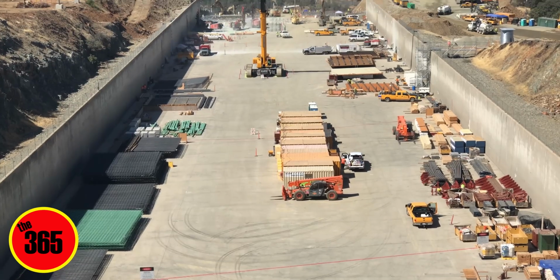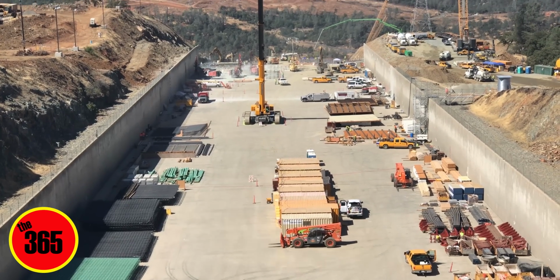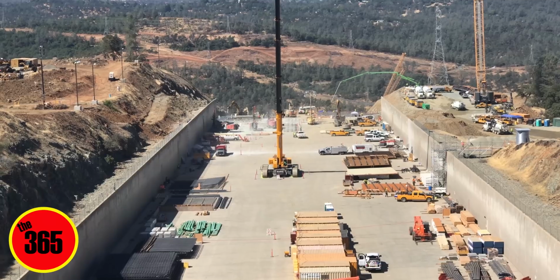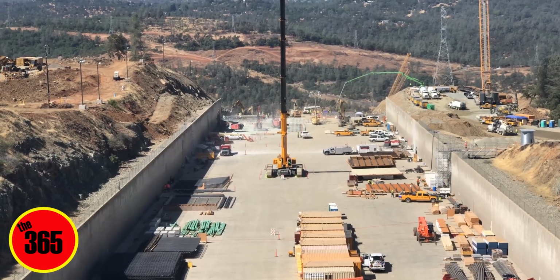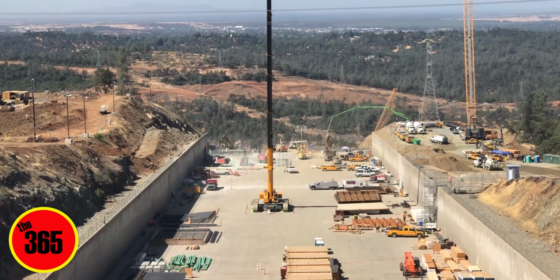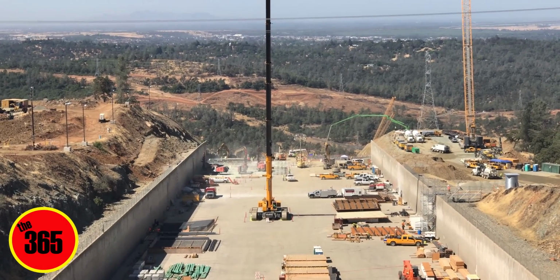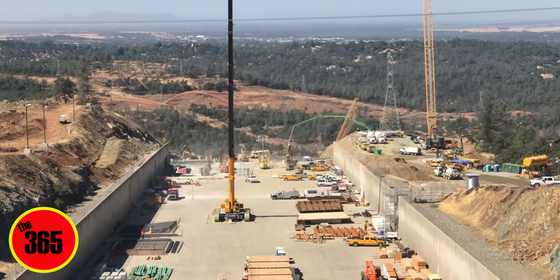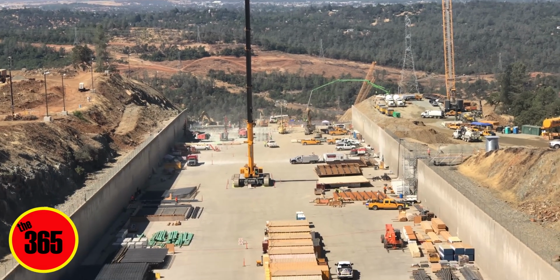Again, we're demolishing up there. If you pan up to the top, you can see those red machines. Those are drill rigs that are actually drilling sections to later be blasted. You can see there's little circular marks along it. They're drilling out all those holes. They'll put in small charges, and they call it small charge controlled blasting. And so that's the demolition of that chute.